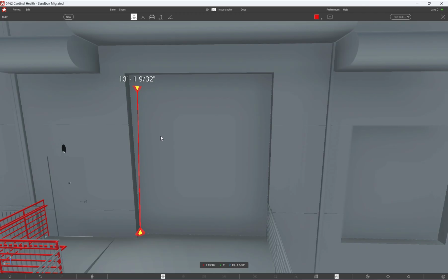And we also have the laser ranger. This one's another great one. Again, the snapping feature is just there for your convenience. So whatever surface you're on, let's say we're down here on the finished floor or on this ramp, this is the base, and it's just going to shoot directly up into the nearest surface. So right now it's going off of this little cover right here. And once we scoot it forward inside this entrance, it will snap. So we have 14 feet here, and that's when we're able to realize that we have plenty of space to get equipment in. And then over on this side, you can see the same effect. It can go off the vertical wall here, 10 feet there, same thing.